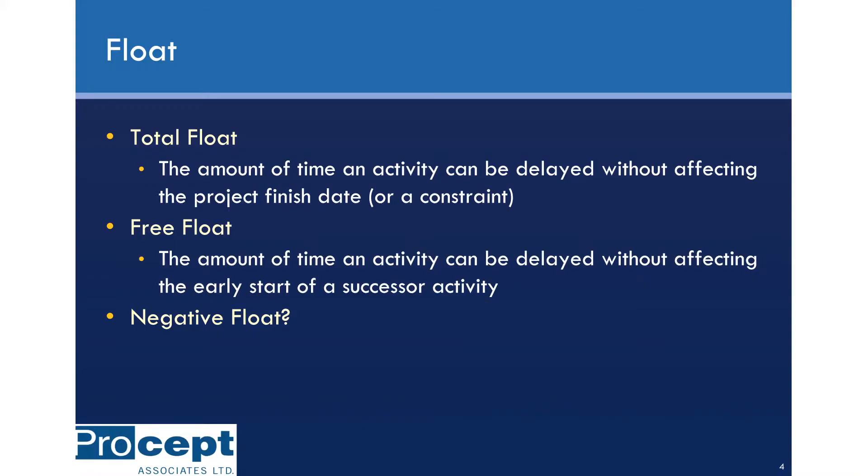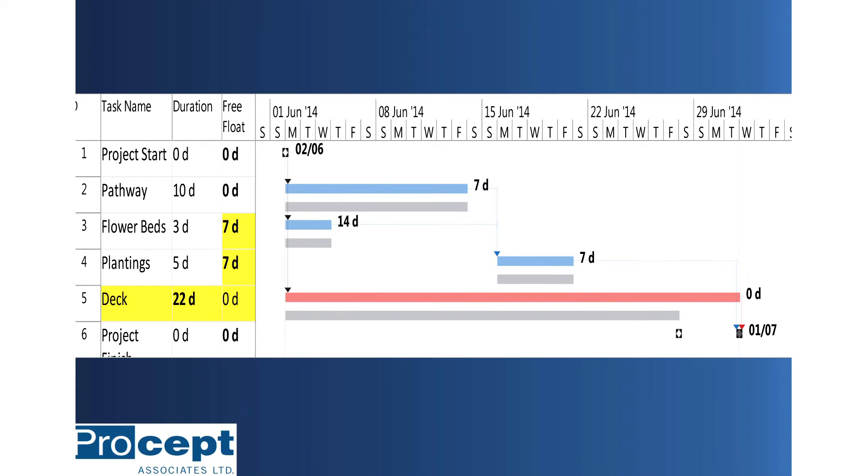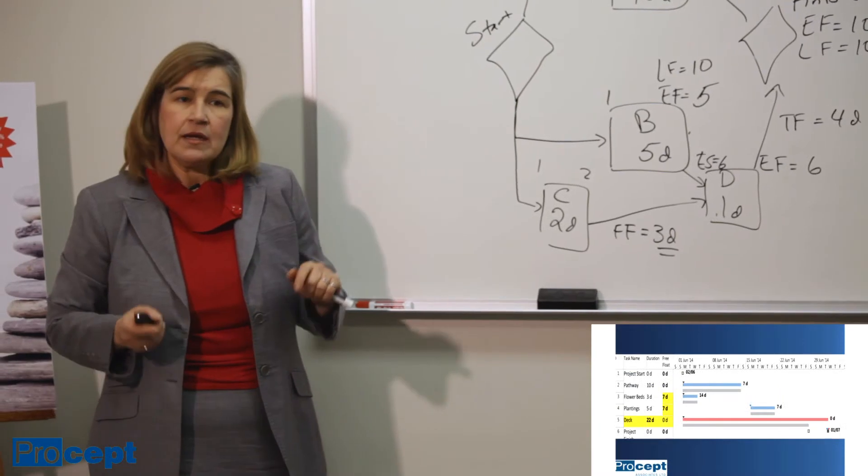Now, negative float, what does that mean? Well, let's take a look at the critical path. Deck is on the critical path. It has zero total float and zero free float. If deck is delayed, there is an immediate follow-on effect on the project finish date.